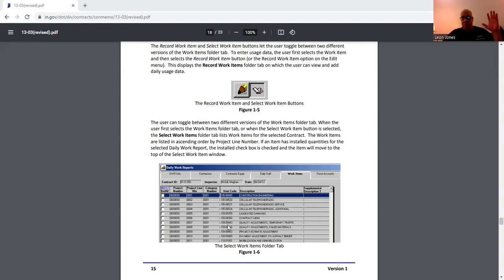Now, if I'm doing a change order and I don't have any of these line items, we create one called a 9999 code. That's what we did in Pennsylvania. Now, if we had curb, let's say curb is an item number starting with 321. You have your curb and gutter, and then your reveal, and then your top of curb. Well, let's say it's something different.